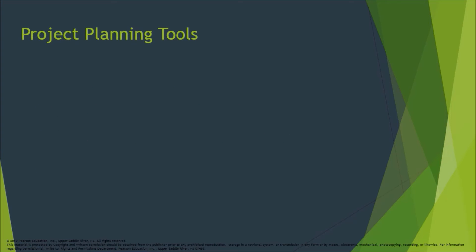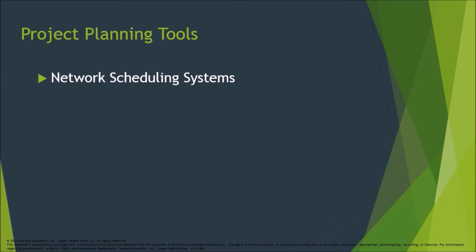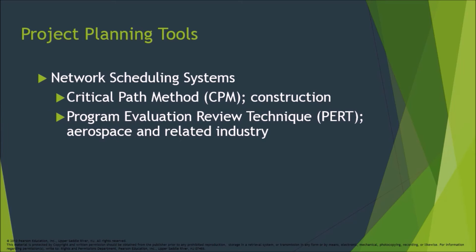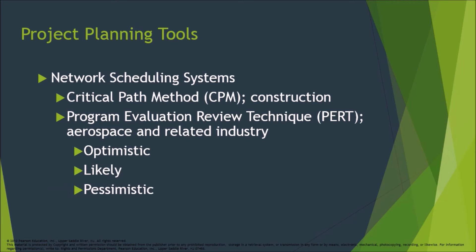Project planning tools — Network scheduling systems: Critical Path Method (CPM) is used in construction. Program Evaluation Review Technique (PERT) is used in aerospace and related industries, incorporating optimistic, likely, and pessimistic time estimates.